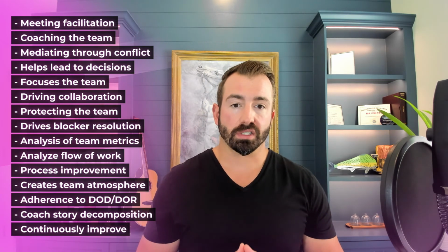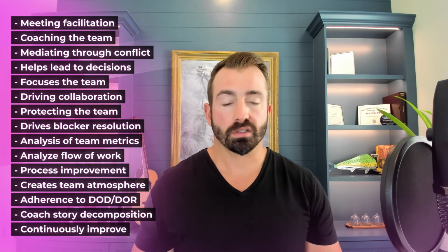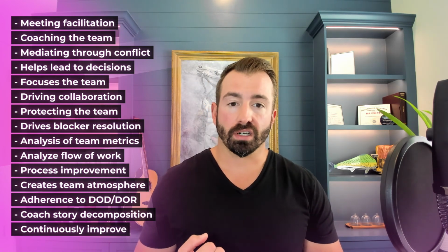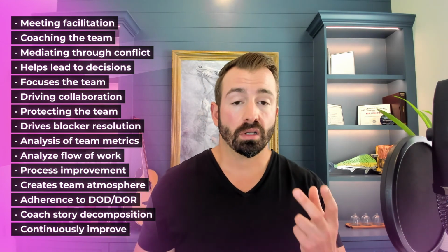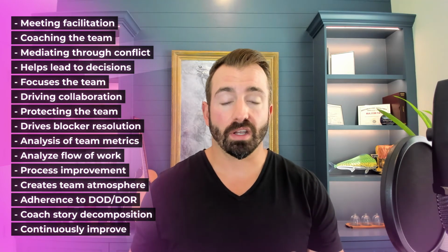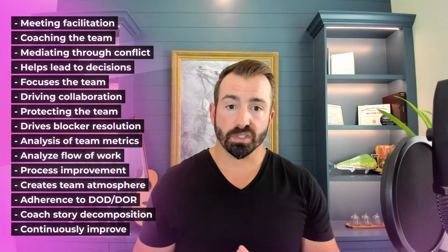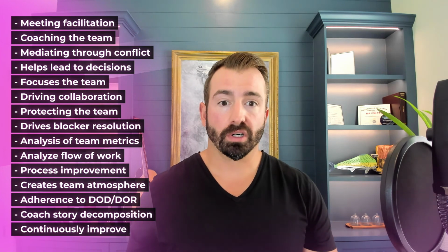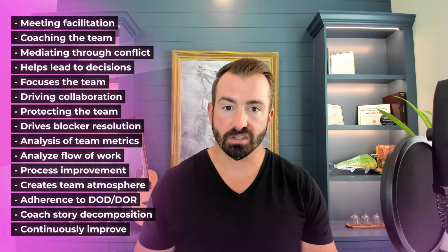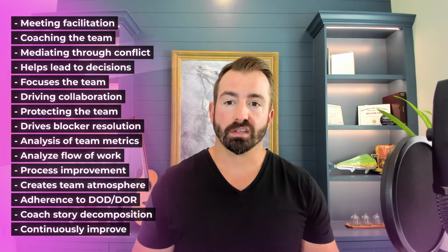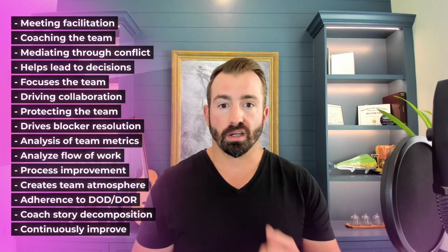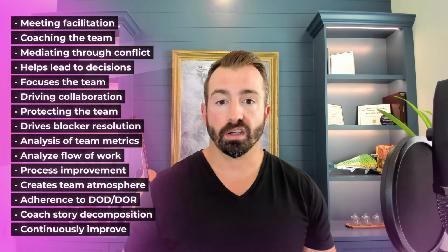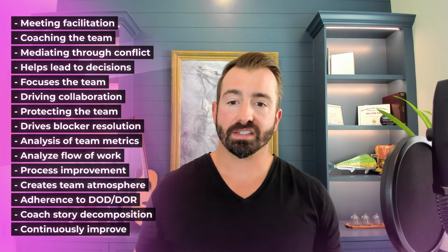Coach story decomposition, especially if the work that the team is working on is complex. This can be difficult. Make sure that the product owners are working to break down the work in a way that makes sense so that you have something that's truly potentially deliverable at the end of every sprint. You may not choose from a business perspective to deploy it at the end of every sprint into a production environment, but at least you can go through the process of testing it end to end, integrating it, and making sure that you're working out all the kinks from day to day rather than waiting till the end of a deployment cycle. And the last is to continuously improve.